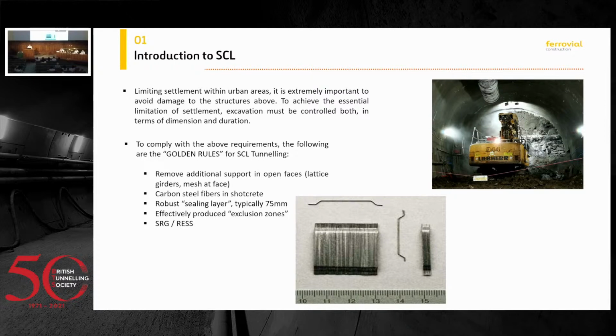SCL, for example in the UK, has been used in urban areas. In urban areas, your idea is to avoid any possible settlement of structures above. So in SCL, you need to focus on controlling advance and timing. You need to understand short advances and provide a fortification as soon as possible. The difference is we're trying to avoid any extra fortification in the face. So usually you avoid any girder, you avoid any mesh in the face. You just do your excavation